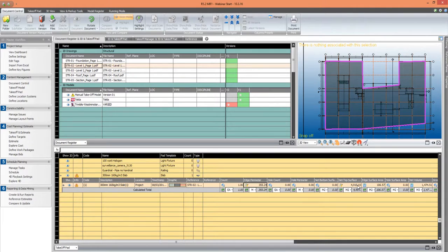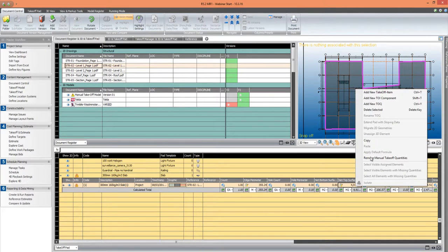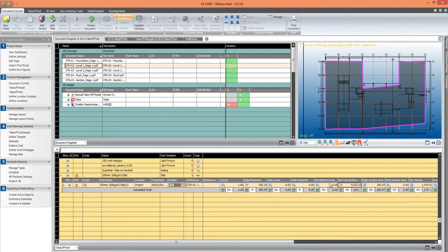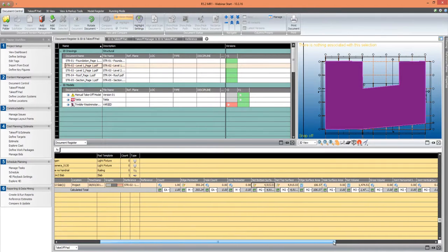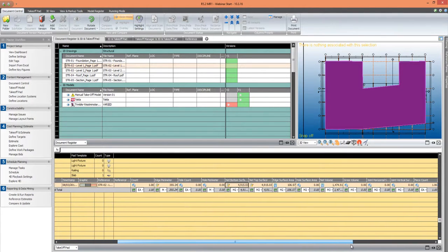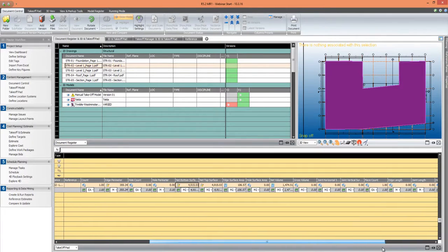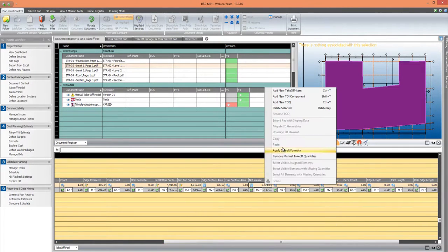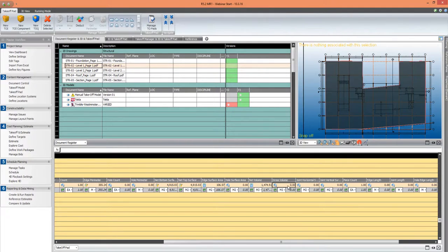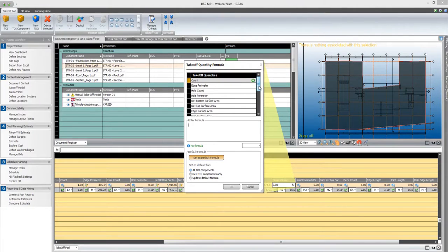And then because of the template, I've already automatically calculated, actually I'll just copy and paste the top surface area to the bottom surface area. So I don't have to remeasure it, I can just use that same quantity again. Then things like my volume and my edge surface area, I've already calculated because I've got an intelligent formula in there. And the depth that you go to with these takeoff pads is entirely up to you, and we can help you try and automate as much as possible. So for the gross volume, I'll just use the net volume again.